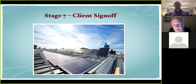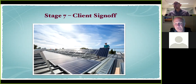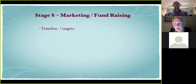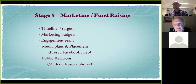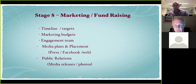Having received pricing from the installer and a quote, they go to the client and say, 'We've been able to lock down our price — are you now ready to proceed?' The client then signs off on the power purchase agreement and they move to the next stage. At this point they start marketing and fundraising — setting timelines and marketing budgets, getting the engagement team on board with media plans. Their best call-to-action and response is Facebook, and they actively set up a PR program with media releases, photographs, and inviting TV and press along to sessions.